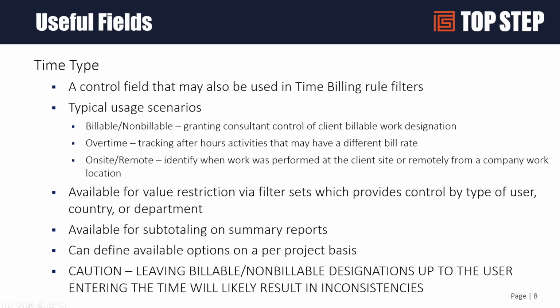And if you're wondering what the alternative is, we typically will recommend that our clients use tasks to control what's billable and what isn't, either through a task type on the task or through the use of the non-billable checkbox on the task, which transfers control of that status from the people entering time to the people managing the project.